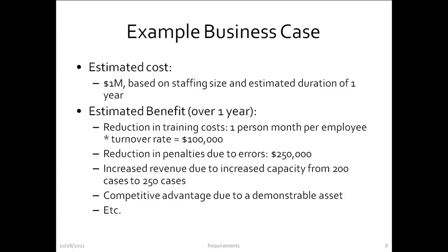Each of them would probably be costing, say, $100,000 a year. So that would make it $500,000. Assume additional time from the potential users of the system to collect requirements and so on.